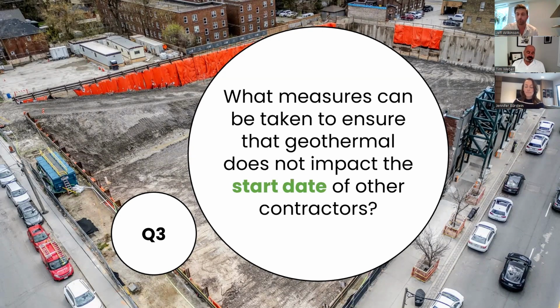If the platform for some reason is deteriorating, whether it's due to weather or geotechnical conditions that weren't conceived, we rely on the CM to make sure that things get moved out of our way, whether it's snow removal or items stored on site for staging, so that the drilling is not interrupted. Quite often there is a little bit of codependency between us and the CM, and that's where that relationship is so key.